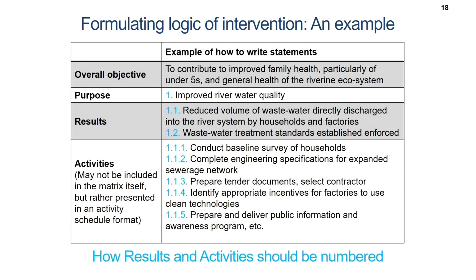Now, what are the activities that can be identified? They may not be included in the matrix itself, but rather presented in an activity schedule format. Activities need not be presented in the log frame matrix. However, we can have a separate activity schedule format, but the activities may also be listed in such a manner. For example, conduct baseline survey of households, complete engineering specifications for expanded sewerage network, prepare tender documents, select contractor, identify appropriate incentives for factories to use clean technologies, prepare and deliver public information and awareness program, etc.